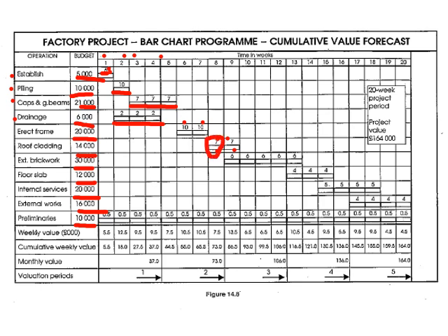Okay, fairly straightforward. And then once you've done that bar chart or a histogram, you can simply just add all your costs. So in this instance, you've got your preliminaries, which is divided over the 20-week period. So you've got your 5,000 plus your 0.5 to get a 5.5, and your cumulative value just underneath that.